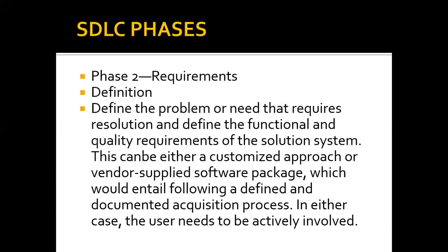So beyond 24 December, if you want to make a change on the requirement, you have to go through a change management process, where you have to more or less report yourself to management.